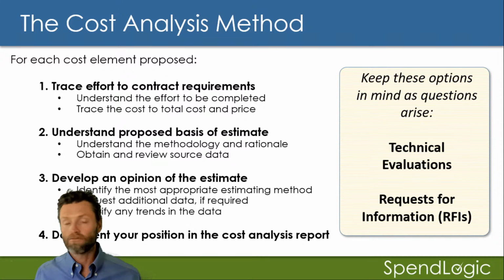The way that you do that is you look at the RFP, you look at the proposal, and you draw lines between them. And you don't have to physically draw lines, you just review them and make sure that they're equivalent. Number two, understand the proposed basis of estimate.